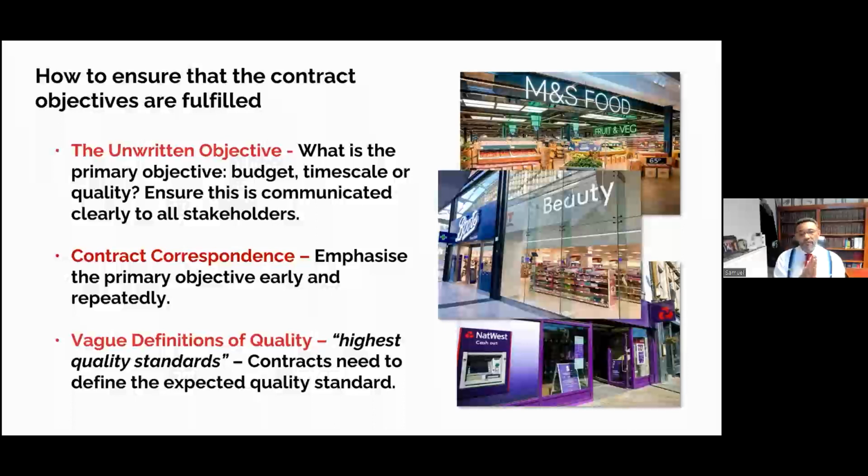If you're doing a retail project, and retailers, of course, are driven to the seasons of, say, Christmas or Easter, and it has to be completed in the ember months, you will find that your client, or the employer, is more likely to tolerate a little bit of a budget increase, provided you deliver on time for them to catch the Christmas trade. Or alternatively, if there were items of quality that didn't quite match expectation, but nevertheless, you've met that timescale.